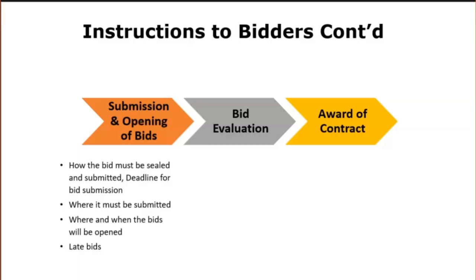If you come to section E, which is bid evaluation, it talks about bid evaluation and bid comparisons. This subsection describes how a bid will be deemed responsive or non-responsive relative to the requirements of the bidding documents, and how the employer will deal with issues relating to minor deviations and or abnormally low bids. All these are in this particular section.